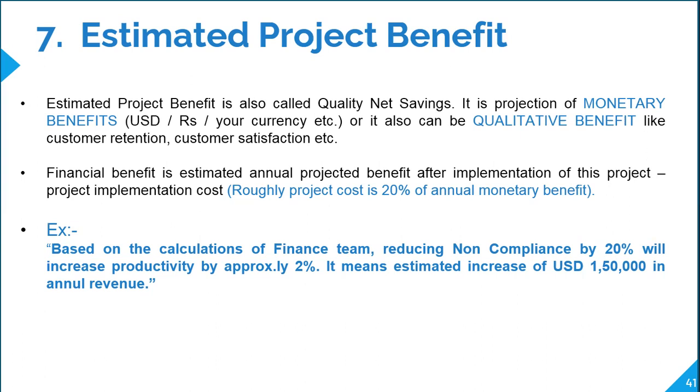But at the same time, for the last 4 months, 3 of your team members have been working on this. So they have spared some time, right? They have a monthly salary, and they work 8 hours, so X amount is the salary. Now, out of these 8 hours, if they spare say a couple of hours on this project, then based on their monthly salary and time consumption in the given project, they calculate the cost of efforts.